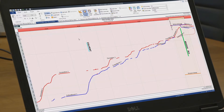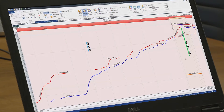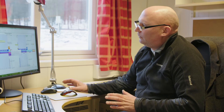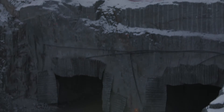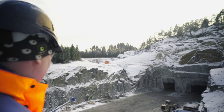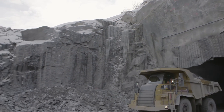A linear schedule not only shows you the timeline, but also shows you obstacles that are in your way. For instance, I have a cover there, I have a bridge there that I can't cross until I move this particular earthwork or build a detour road around it. We can make sections that say in this part we cannot work between December and February because the weather is really bad, so we can move the production into the tunnels when we are not affected by the weather at all.